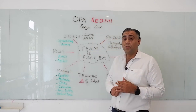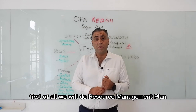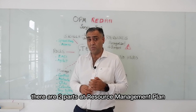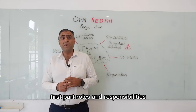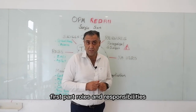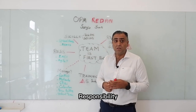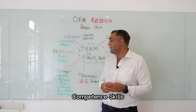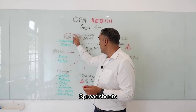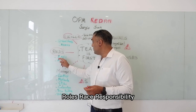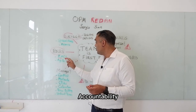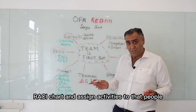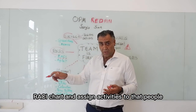First of all, we will create a resource management plan. There are two parts. The first part covers roles and responsibilities: roles, authority, responsibility, assigned duties, and competence — skills. We use spreadsheets: a RACI chart covering roles, responsibility, accountability, consultant, and inform. A simple RACI chart to assign activities to people.